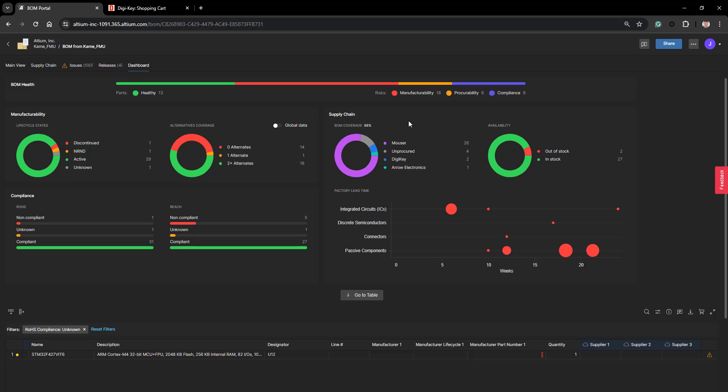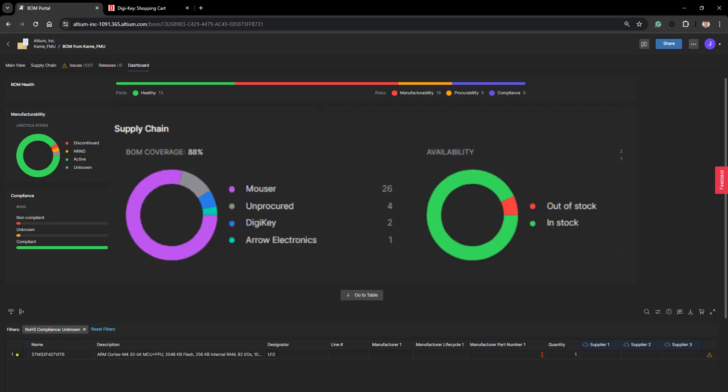The next area is your supply chain, broken down into two areas: BOM coverage and availability. In BOM coverage it looks at your suppliers — who you intend to purchase the components from — and also identifies components that might be unprocured and do not have a supplier. This is an area that is constantly changing, reflecting the dynamic aspect of working with components and procuring them. It is very important as you run through your project to constantly be looking at your supply chain and availability, making sure there have not been any changes.